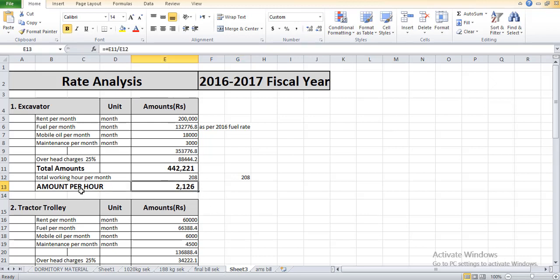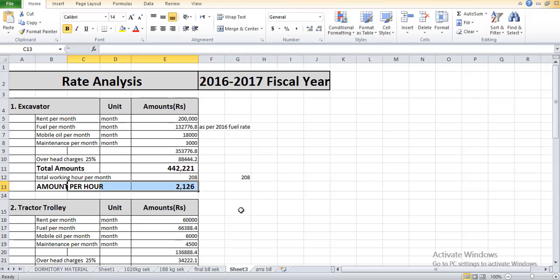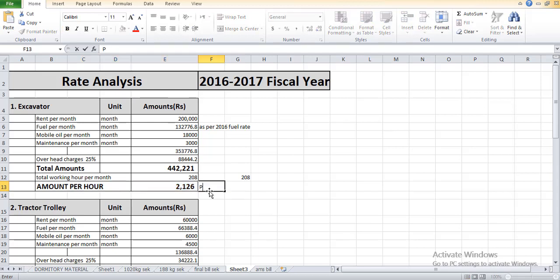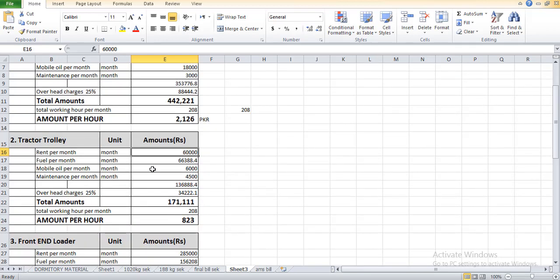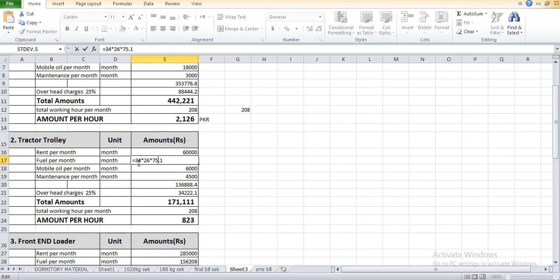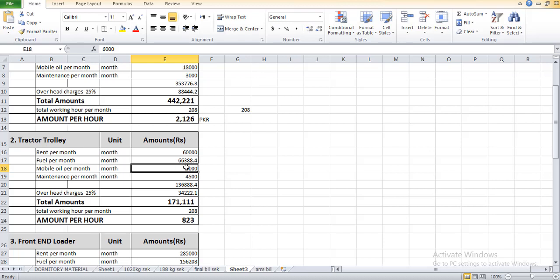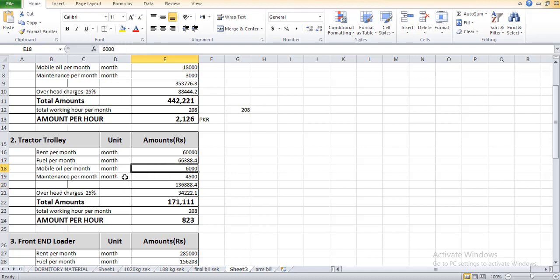Similarly for the tractor trolley, the normal rent was 60,000. The fuel required is 34 liters for 8 hours and the total month 26 days we consider for the contract. This is the main thing. The per liter charges is 75.1 which will become 66,388 rupees.